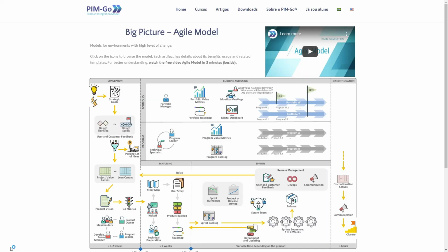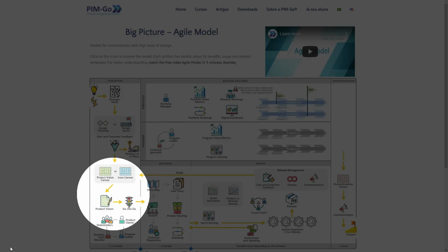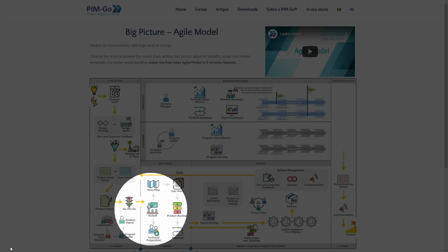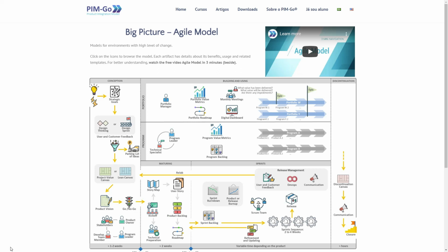After the team discusses and fills the canvas, you have a better understanding of what the solution will be. Then you summarize those into a product vision. This vision is going to be shared with the future teams and is relevant to keep the core value proposition always on their minds. So if it's approved, we move then to the maturing stage, where the solution is going to be better detailed. The goal here is to have an initial product backlog before starting the sprints.